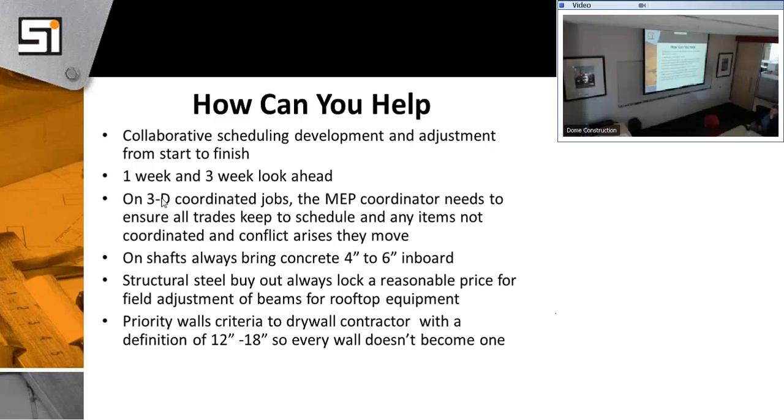It's an MEP job to stay on top of it, because you're detailing to hit inserts, you're detailing to load a floor. So staying on top of that detailing process, we see a bunch of kids thrown into these MEP positions, and they don't know construction, they don't know how to control field guys to get things done. And so we're virtually drawing it, but in real life, it's related to your schedule of install. So more of that could be controlled.